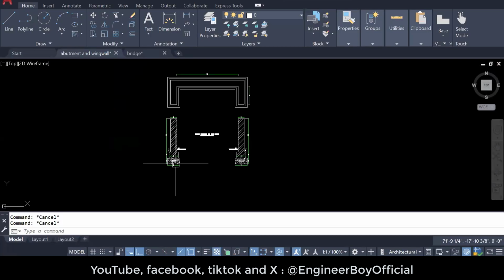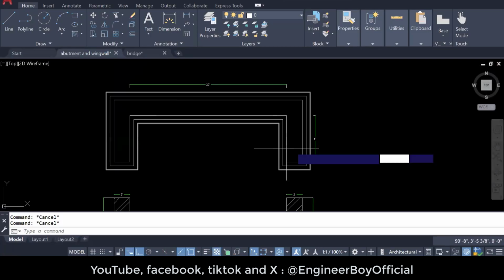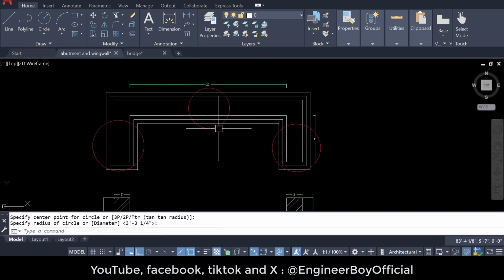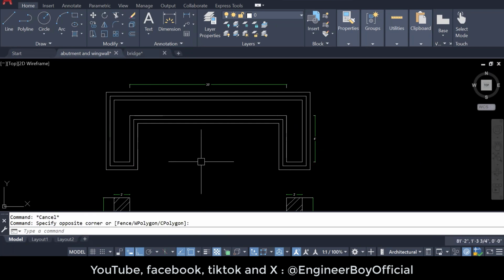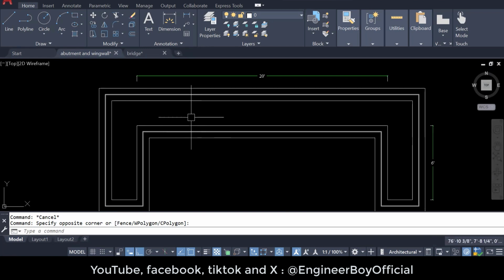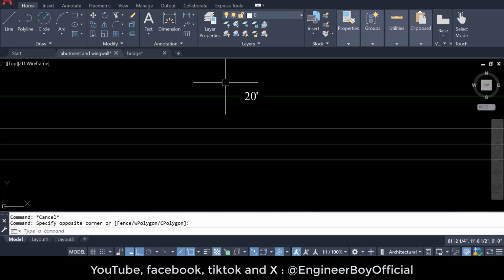How? You can just see it, okay? Wing walls, these are actually 2. One is this one, another one is this one. Now abutment, which is this one, and that's actually one only. The excavation length, if you remember, we have already discussed these things in the very first, third, or maybe four lectures, that the excavation length is somehow very different, okay? Now, the abutment length, as you can see, this is 20 feet, which was already mentioned.